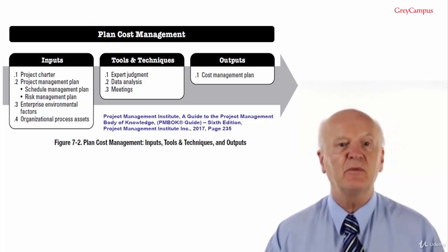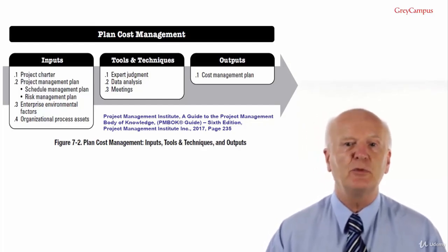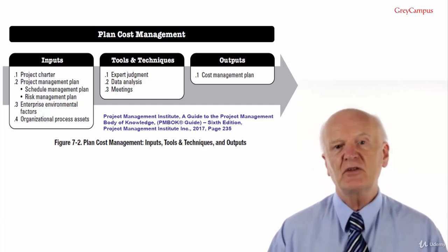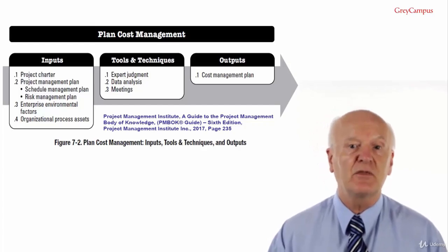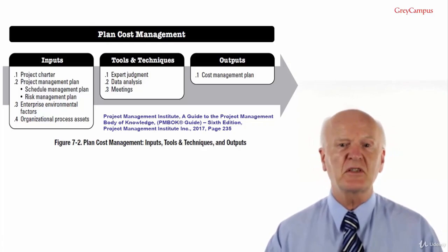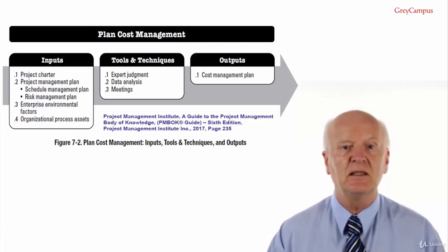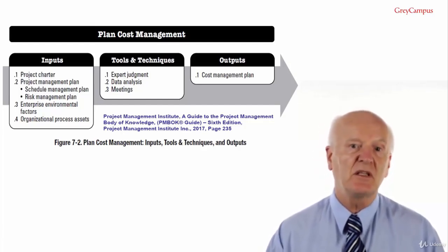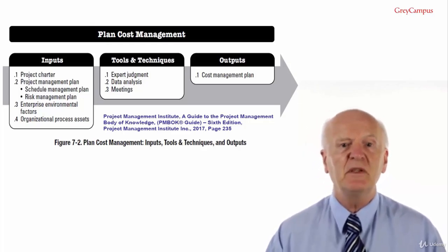Public commercial information such as resource cost rate information is often available from commercial databases that track skills and human resource costs and provide standard costs for materials and equipment. This is particularly true of mature organisations such as construction, mining, oil and gas, military and others. Published seller price lists are another source of information, and some organisations, especially in government, obtain lists of approved vendors.